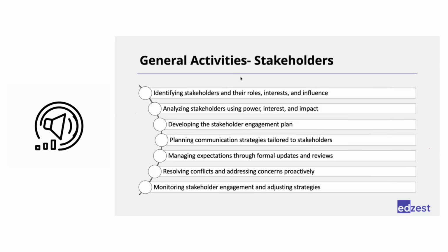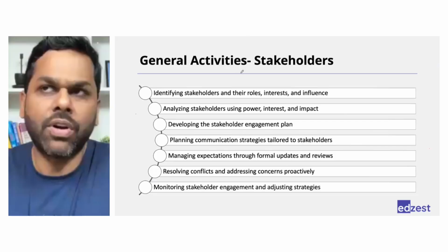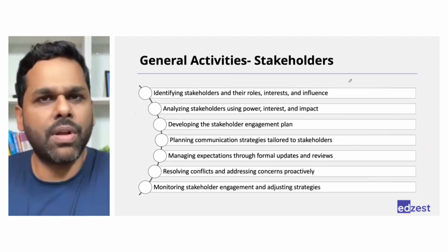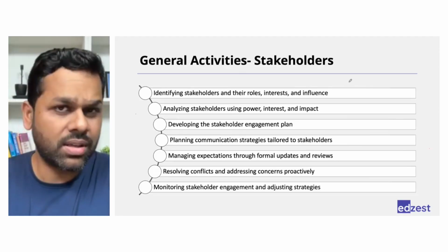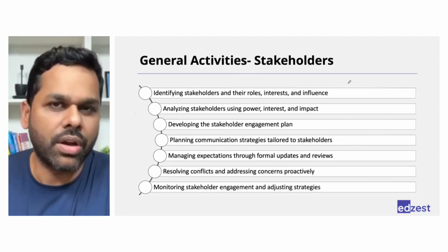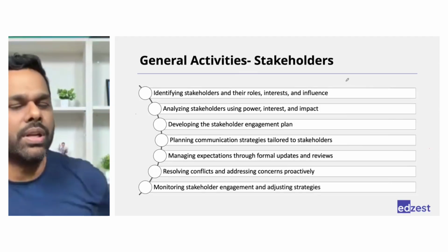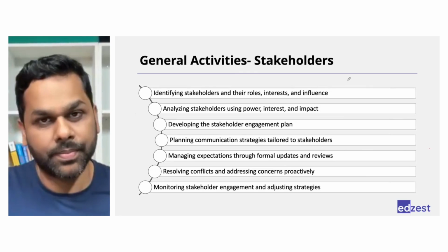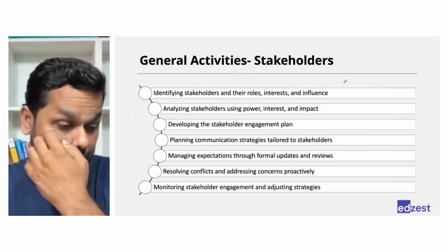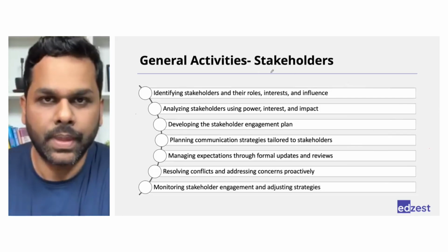Project manager will be having an authority to remove people. They can. Of course, they will be mentioning this to the management and everything, because removing people will also mean impact on cost, impact on schedule, right? So it needs to be informed, but yes, they have the authority to ask a team member to leave the project, as long as they have managed the project schedule and everything.